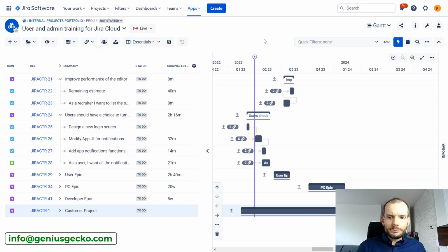But for you as a project manager, this hierarchy is not really sufficient. You need an additional level of hierarchy representing, for example, project phases. You could do this as Jira tasks, but that would require a change in the configuration of your instance, probably the introduction of a new issue type.